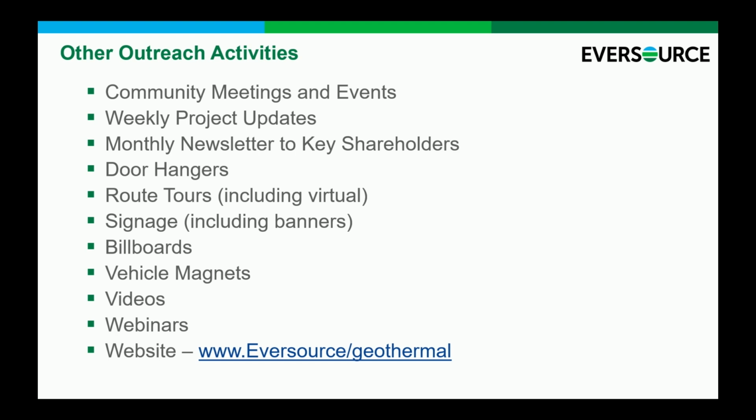We send weekly project updates out to the residents along the route to let them know little things like what areas of the street we are going to be impacting, which ultimately updates traffic patterns. We send things out on timelines, where we are in the project, so that these customers feel like, and these are their words, not mine, we are over-communicating. And they've thanked us for it because transparency has been a big piece of this, and quite frankly, why the customers are still happy today, even though we've been out in the neighborhood a little longer than we originally thought.